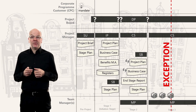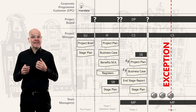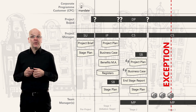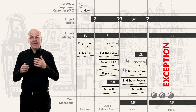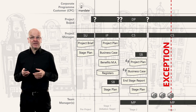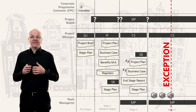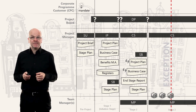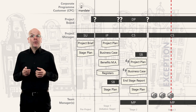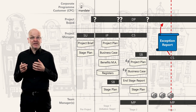So how will the project manager respond? They must first examine this issue — like creating an issue report — and consider the impact on costs, benefits, and time. They will perhaps work with the team manager to suggest how to deal with this issue and write a report that's easy to understand.